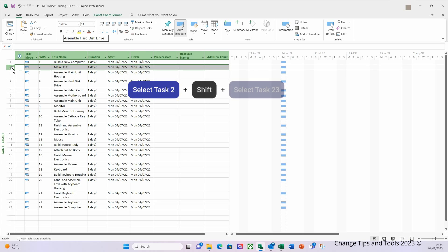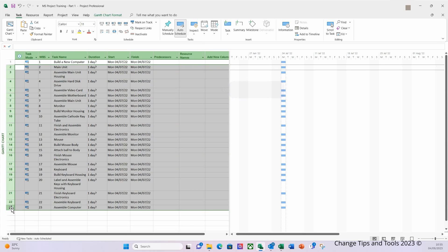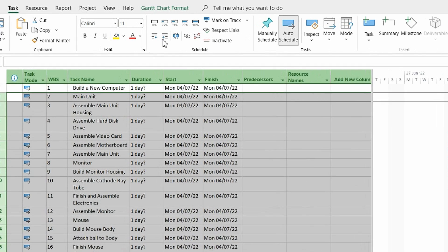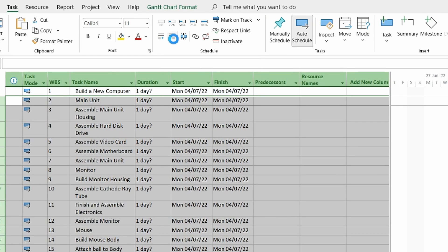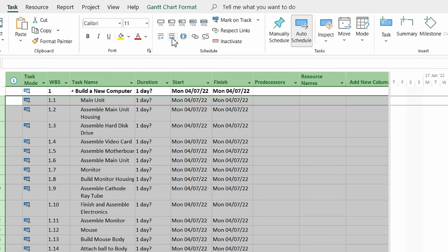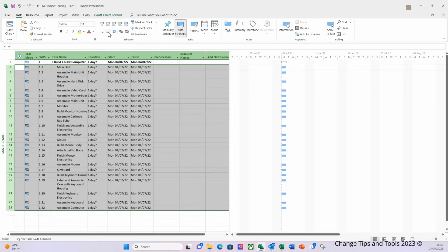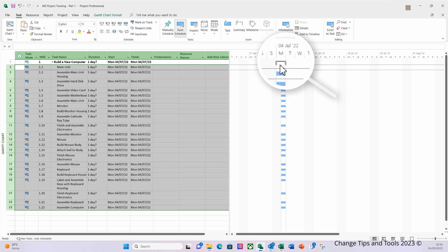I'm going to select here on the left the 'Main Unit.' I'm going to hold down the shift button and I'm going to select 'Assemble Computer.' Then on the task ribbon over here I'm going to select the right indent button. As you can see now, the 'Build a New Computer' has a slightly different graphical representation which denotes it as a summary task.